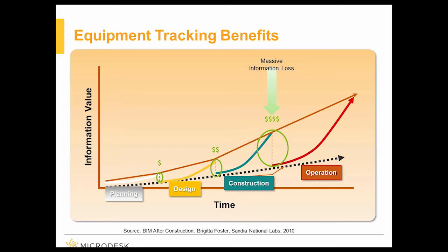So if you're doing something for an owner, a set of as-builts, you're putting together binders and manuals, warranty information, maintenance information, rather than handing them, okay, here's a roll of drawings, and here's a couple of boxes of the books that you'll need to manage your facility. Now what you can end up doing is having this whole setup online, all pre-done, and they can find the equipment, they can track the equipment, and the information relative to that equipment is already connected to it. There's not going to be any searching through boxes to try to find that specific piece of information that you need.